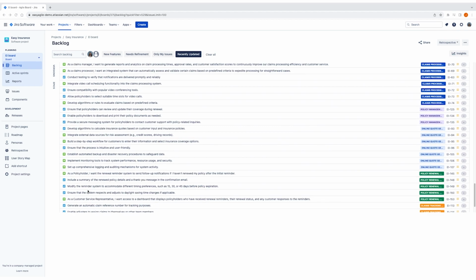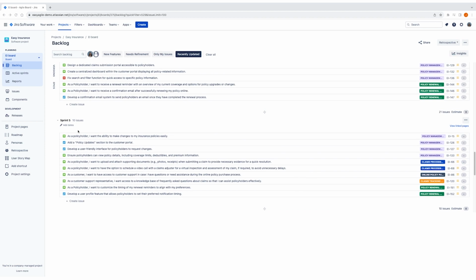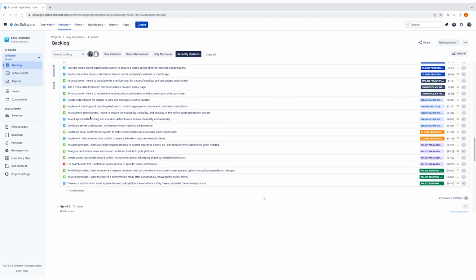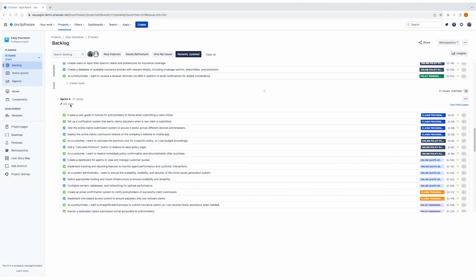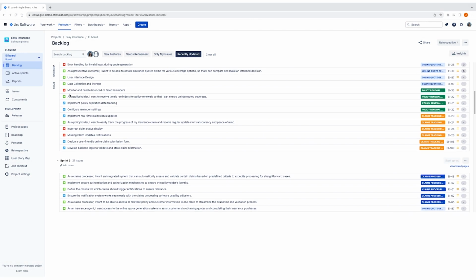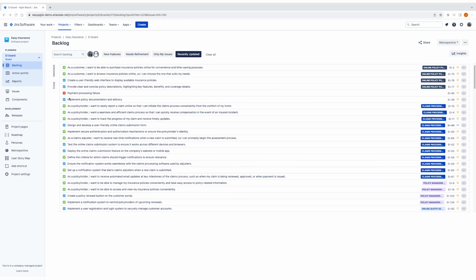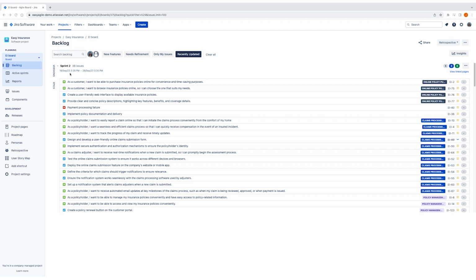If we're practicing Scrum, the backlog is split into future sprints to provide an indication of what will be delivered and when. The backlog is intended to create, prioritize, and select work for development. But bigger is not better when it comes to the backlog. You might have 10 actionable things to be done, or you might have 100, 1,000, or more. This is where the user story map in TeamRhythm steps in.